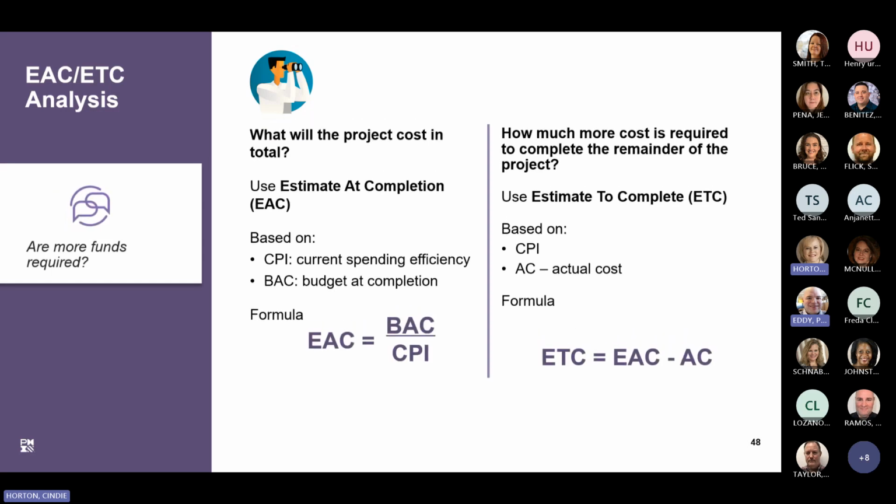So project teams use forecasts to consider what might happen in the future so they can consider and discuss whether to adapt plans and project work accordingly, right? Forecasts can be qualitative, such as using expert judgment about what the future will hold. They can also be causal when seeking to understand the impact a specific event or condition will have on future events. Quantitative forecasts, on the other hand, seek to use past information to estimate what will happen in the future.